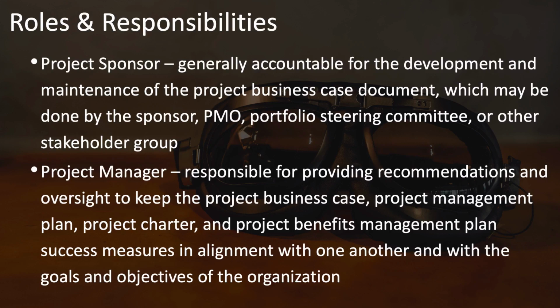The project manager is responsible for providing recommendations and oversight to keep the project business case, the project management plan, the project charter, and the project benefits management plan and its success measures in alignment with one another and with the goals and objectives of the organization.